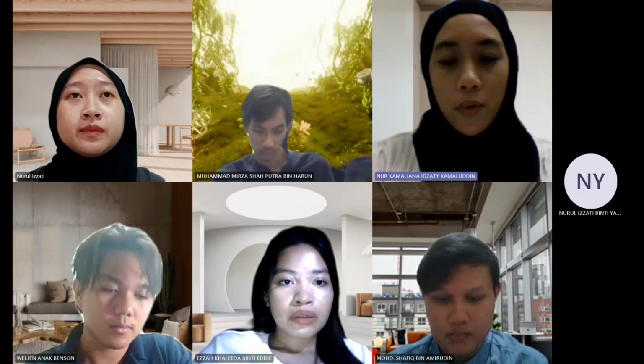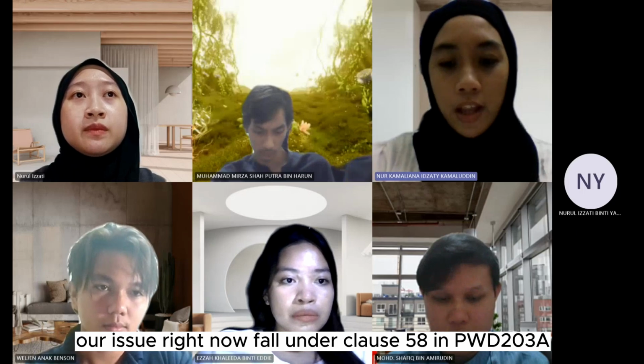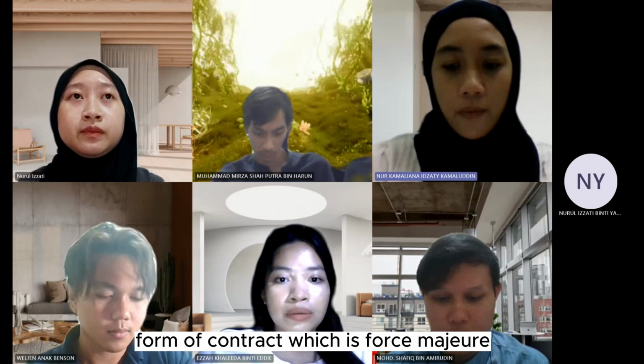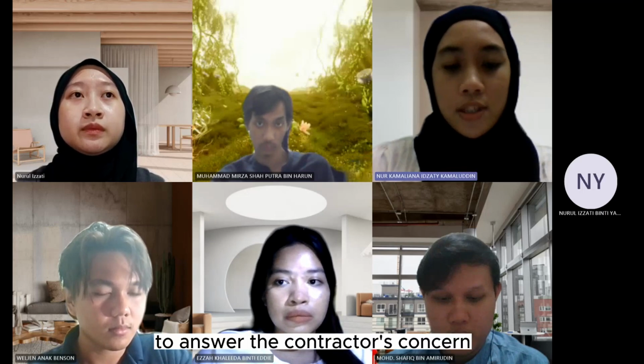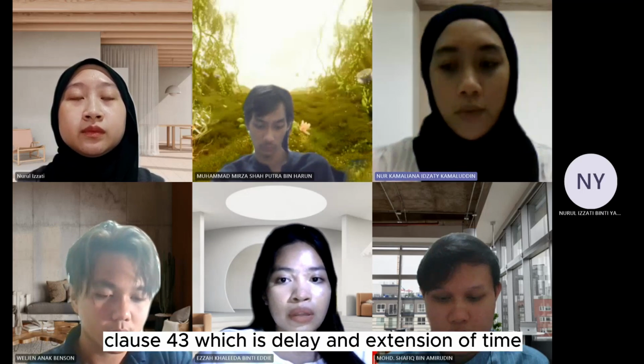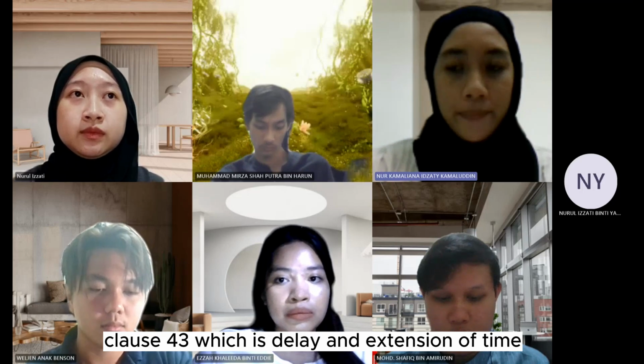To begin with, our issue right now falls under clause 58 in the PWD 203A form of contract, which is force majeure. To answer the contractor's concern, the issue falls under clause 43, which is delay and extension of time.